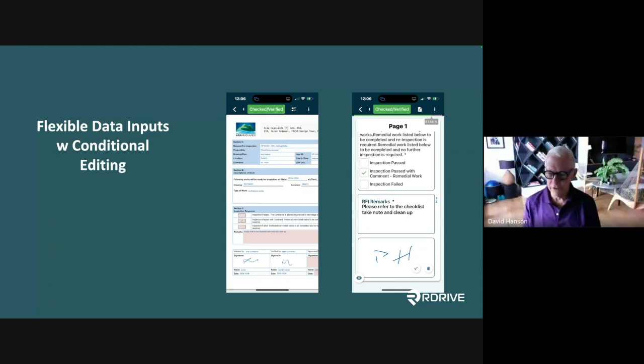If you're doing something like a site diary or site daily report, where you're trying to check your manpower and equipment, whether it's idle or operating, you can do that in a digital form, and you may want to because it'll allow you to scroll through and talk about cement mixers and how many are on site, how many are operating, how many are idling, what was expected, rain and all that.